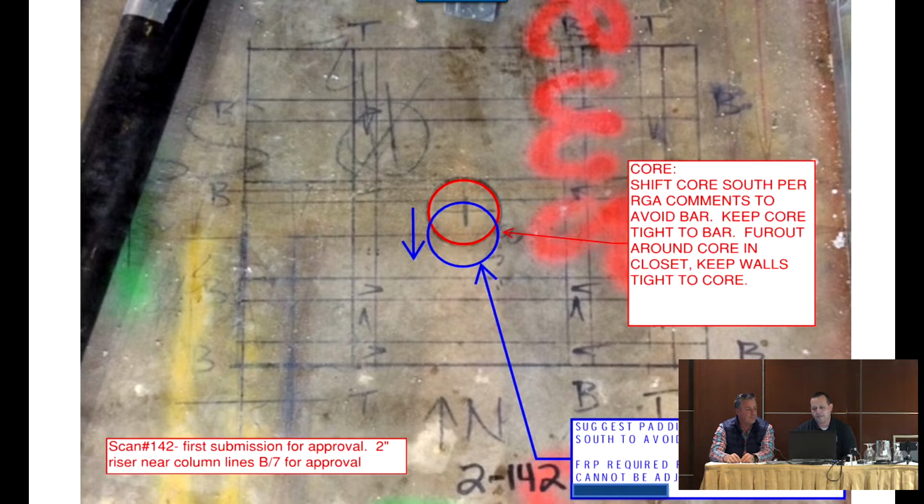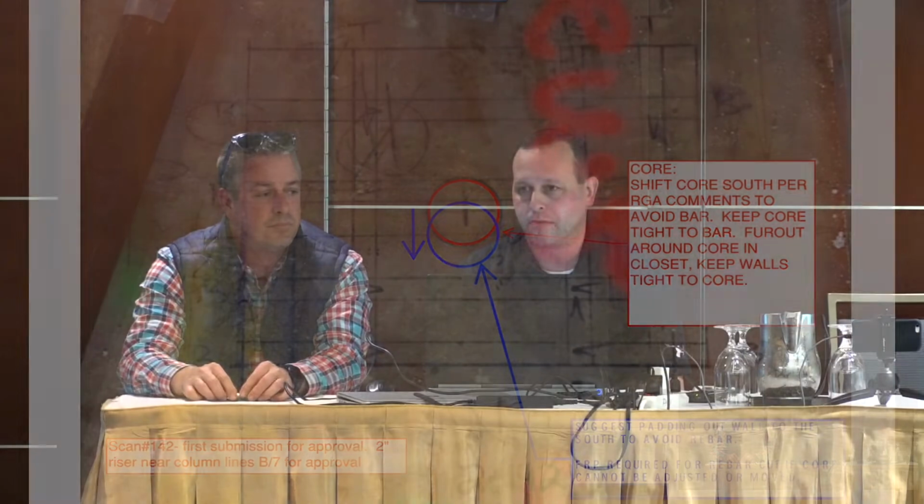The problem really comes when things get shifted. So you lay out per design. If it doesn't get relocated, that's not a problem. Once things start shifting around and people are making adjustments in the PDF, we start losing valuable information. I don't have the time to go into a 143-page RFI every single week and track, where is this on plan? Which way did it shift? So you start losing very precious information.